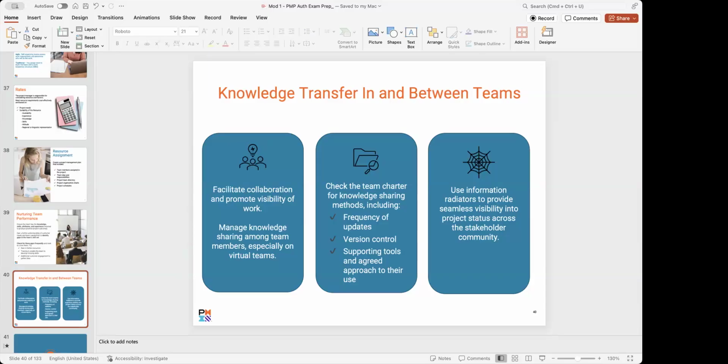Because we actually completed or managed the project for 2024, and now we need to hand it over to them for 2025. So we did some knowledge transfer. We shared documents that we put together that helped us with understanding our project, and we put documents together with some lessons learned, some things that we really did not do well, and had to pivot mid-project, and we shared that as well.